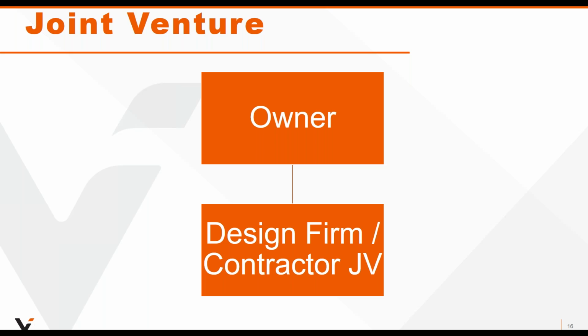One of the things, we come at it from claims. How does the joint venture agreement address disputes and pursue claims? How will you resolve owner-related claims? Who's going to take the lead? And what's the role of each party? All of these things certainly need to be addressed in your joint venture agreement.